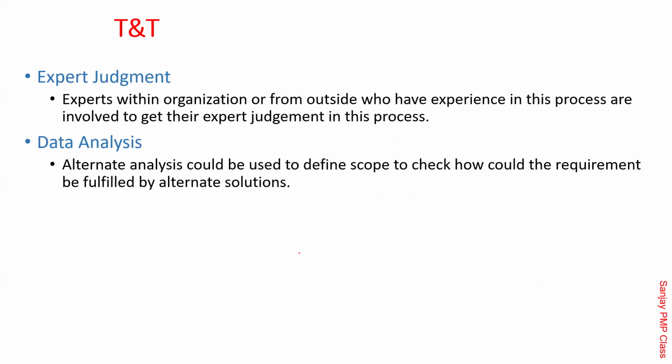For doing this you need expertise, the technical guys are coming into the picture here. They need to do a lot of data analysis, for example, alternative analysis. To reach this particular thing, should you develop something yourself? Should you outsource it? Should you integrate some product? Those are multiple ways. The requirement is what the customer said, I want it this way. Now, how you do it is up to you. So there are multiple ways to deliver them.